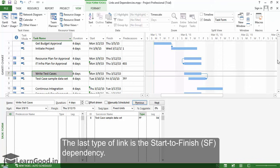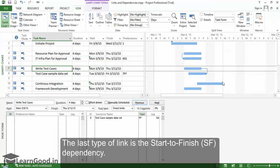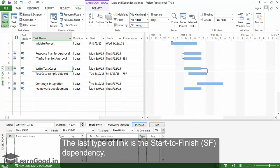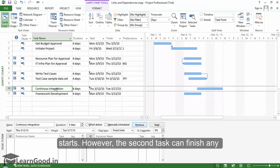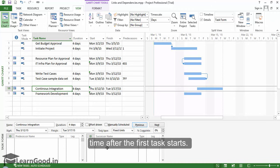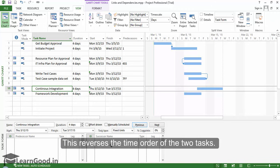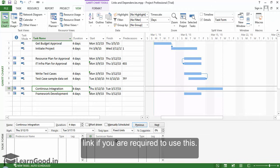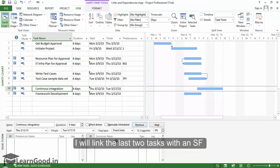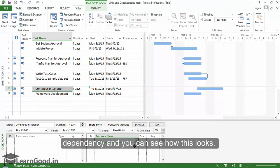The last type of link is the Start to Finish dependency. When you use this type of dependency, you are saying that the second task in the relationship can't finish until the first task starts. However, the second task can finish any time after the first task starts. This reverses the time order of the two tasks. You should not be using this dependency very often and should carefully evaluate this type of link if you are required to use it. I will link the last two tasks with an SF dependency so you can see how this looks.